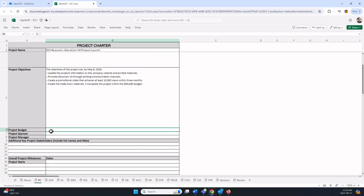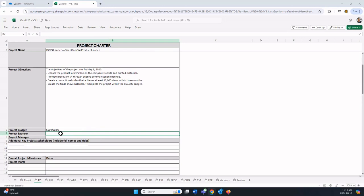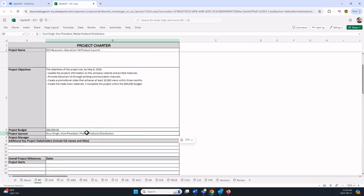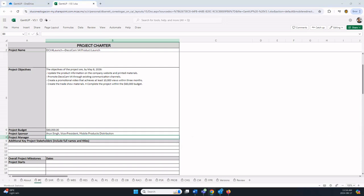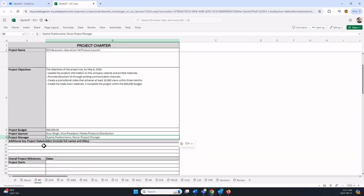The budget is $60,000. You don't have to enter the dollar sign or commas. Excel will automatically format it for you. The project sponsor, I'll copy this in. Notice we put the job title or position. The project manager in the textbook is Sophie Featherstone.